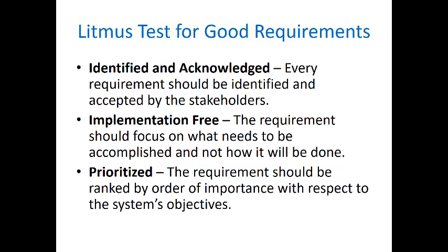And one other important feature also is that you want to prioritize your requirements. This is important because a lot of the times we have a long list of requirements and expectations from the system, but we may have limited time and budget. If you prioritize your requirements, you put more focus on those that have high priority. And if you have any time or budget limitation, you drop those that don't have much priority.